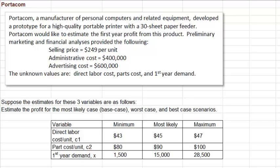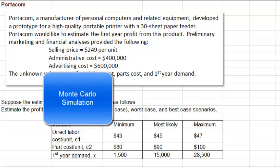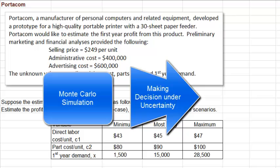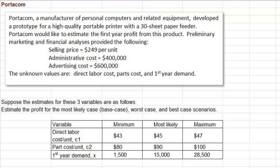We are going to concentrate on a simulation called Monte Carlo simulation. Monte Carlo simulation is used to make decisions in situations where there is a lot of uncertainty. You might recall in project scheduling, when you don't know how long each activity will take, you come up with three possible times for each activity — the shortest possible time, the longest possible time, and the most likely time. From this, and assuming each activity time has a beta distribution, we could estimate the probability of finishing by a certain deadline. We do something similar in Monte Carlo simulation.